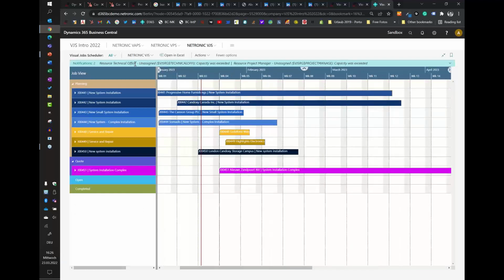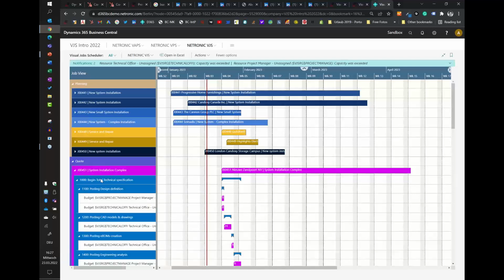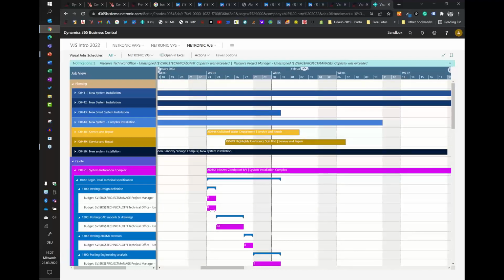So now let's look at what we can do with the VJS. First of all, we got this notification here, right? It tells us, hey, you have right now, and I'm in the process of quoting this project. And when I'm quoting the project, I have it already time scheduled, right? Let me expand it all. You see, I have defined all my tasks. I have defined which type of resources I need, and I have budgeted these because I already put in figures here. So I say 8 hours of a project manager, 8 hours of a technical office guy. When they are ready, the technical office guy needs to continue working on this 24 hours, so 3 days.